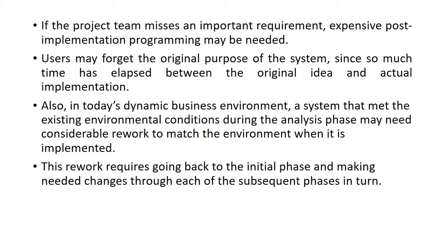If the project team misses any important information from the documentation, then what will happen? Then we need expensive post-implementation programming to find that missing information. And due to this, what will be the disadvantage? The user who is going to use this system may forget the original purpose of the system, because there is time elapsed between the original idea and the actual implementation.